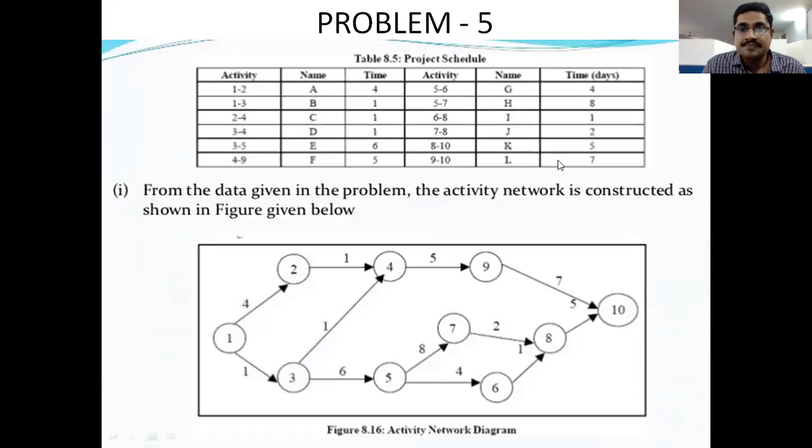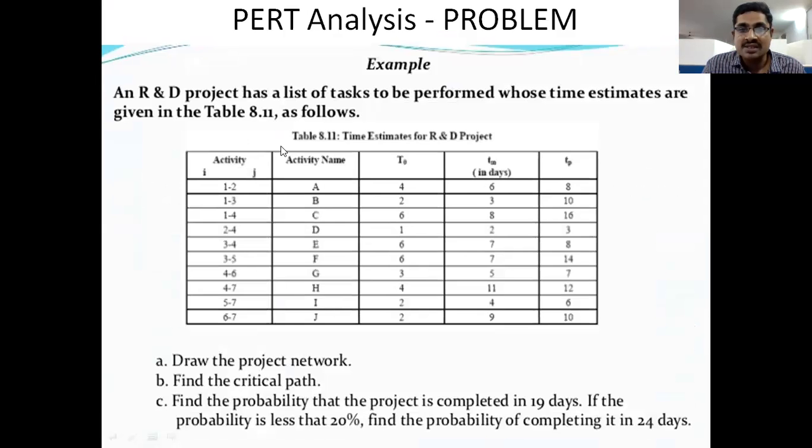But here, in this pattern, they give three types of timings for each and every activity, because we don't know the exact time for the activity.